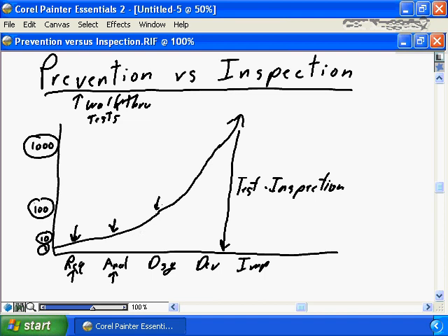Similarly, if we don't find it until we're in design, at the $100 level, we're now going back, having to rework and potentially even redesign components for our project to ensure the new requirement fits in, on through development, where we have to undo some work that's already been done for the project, and then we have to redo, and so on.